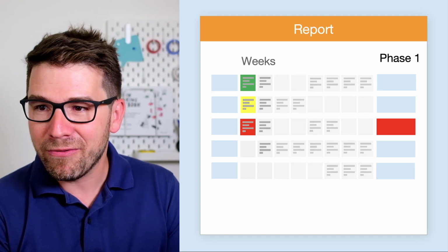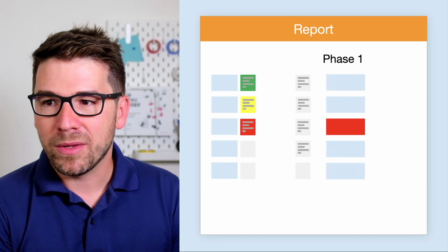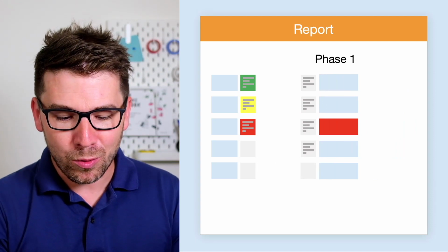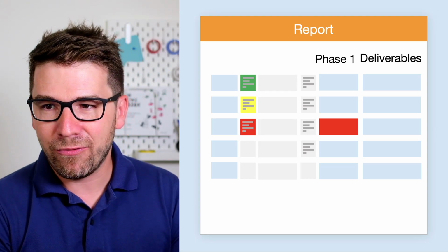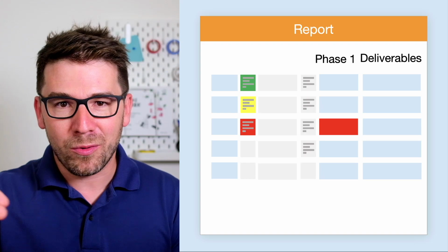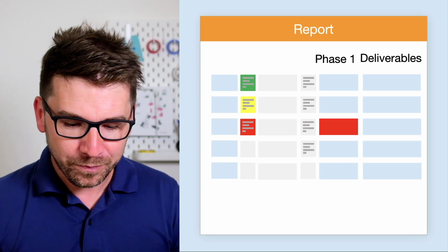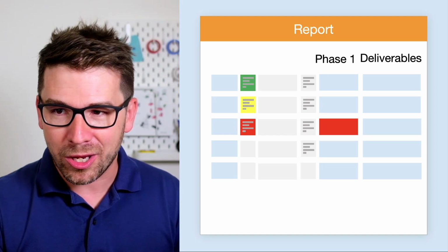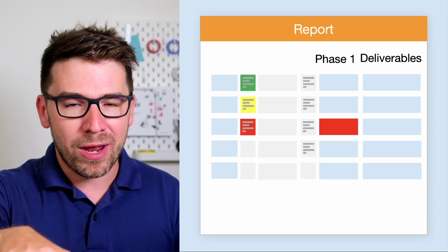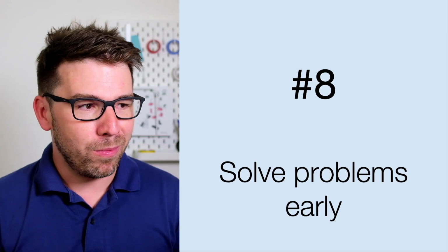If you want, you can simplify it by just showing the week that just passed and the following week. If it's a several phase project, it's also good to include what's in the end, what the final deliverables are. And then just for each category, put a few sentences of comments, especially for those that are in yellow or in red. For the sponsor to understand why something is yellow, what's the plan to catch up, and if it's red, why it is in red, and what the consequences for the project are. So that's the report.